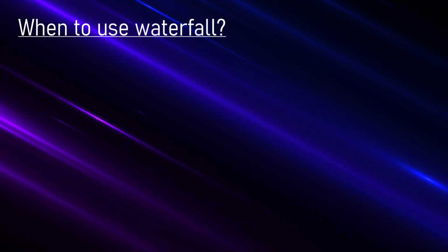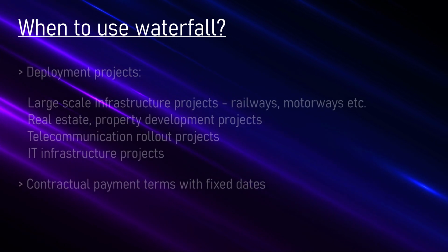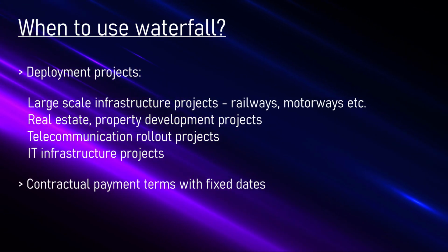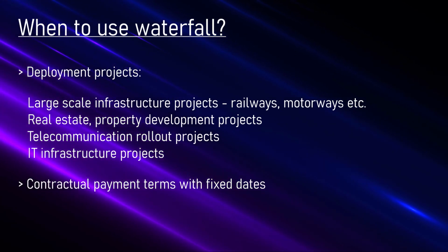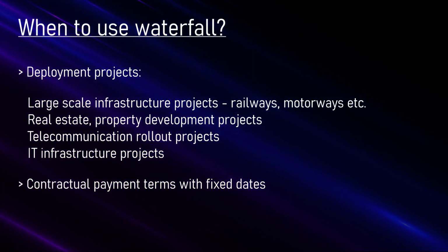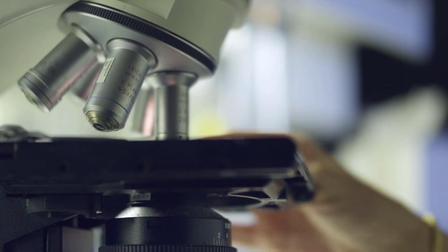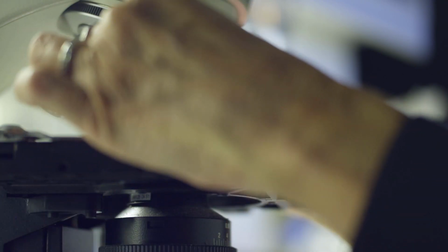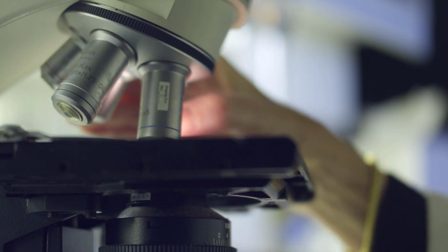Because Waterfall is a structured, document-driven methodology, it is best suited to deployment projects and projects with contractual payment terms linked to fixed delivery dates. A good example of this is building a property. Research and development of how to build a house, along with the materials being used, are tested and approved prior to being considered in any commercial plans, so you don't have to factor this in.